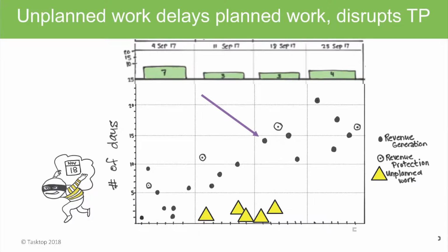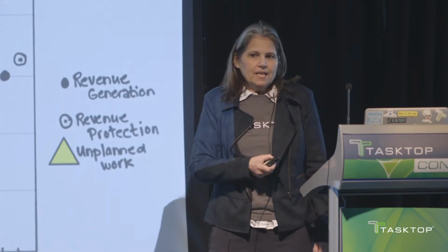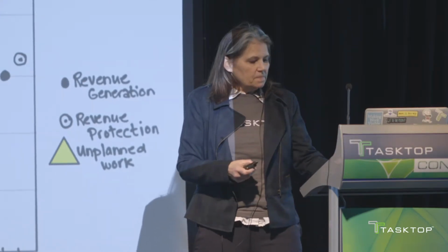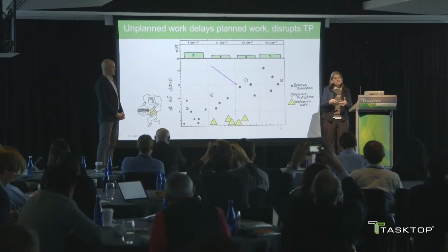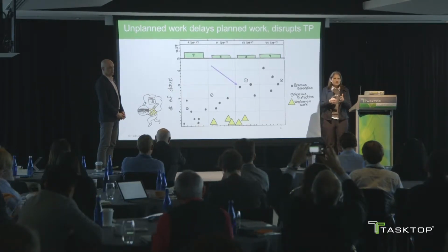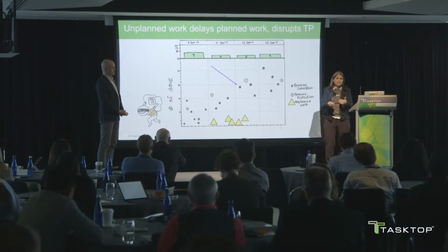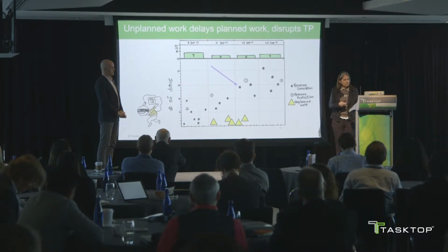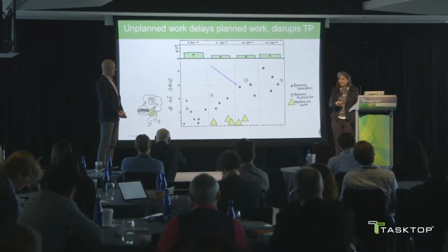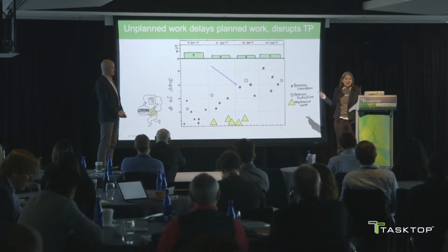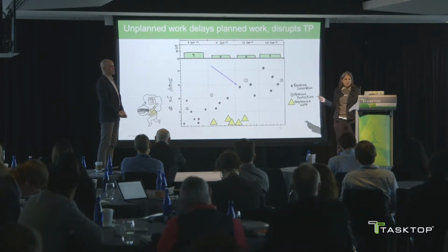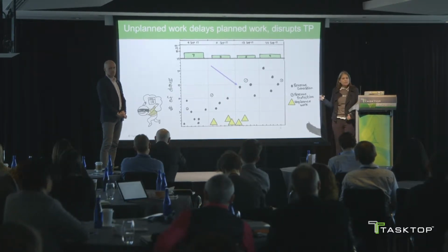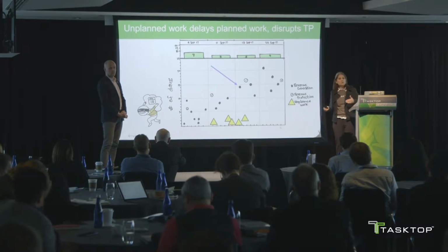I'm going to take this moment to introduce time thief, unplanned work. Unplanned work can impact your throughput numbers, your flow velocity numbers, because one reason we use flow velocity is so that we can calculate the trends over time and we can start to set better expectations for when we're going to deliver something. Our forecasts, our estimates can be improved with respect to the delivery rates. But when we look at unplanned work, if you're tracking unplanned work, it will show up in your metrics. And if you have a lot of it, then you can start to see why some work gets delayed and the relationship between your flow time and your flow velocity.